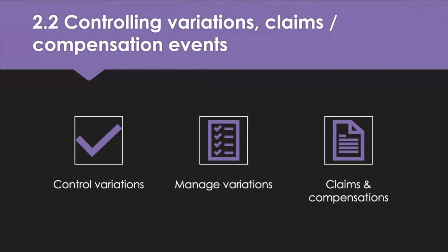It should also include how the cost for variations will be calculated and how the risk will be shared, and specify that changes can only be incorporated into the project when a variation order has been submitted. And the project plan and brief should be as clear and detailed as possible.